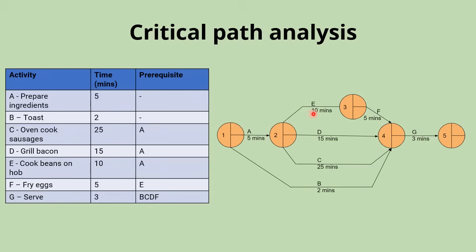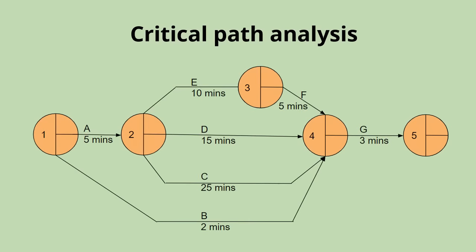We can only fry the eggs once we've cooked the beans, so we have a third node with activity E (cooking the beans) going into it and activity F (frying the eggs) coming out of it. Then we have node four, because we must have completed the eggs, the bacon, the sausages, and the toast before we can serve up. Activity G (serving) comes out of node four, and finally we finish with node five to show the end of the project.